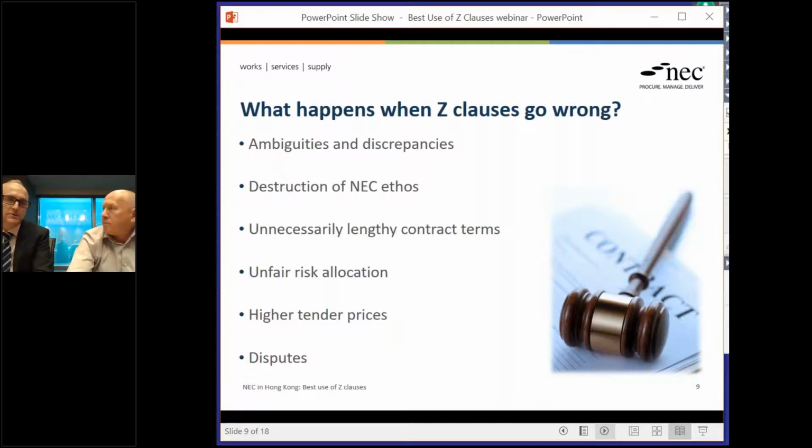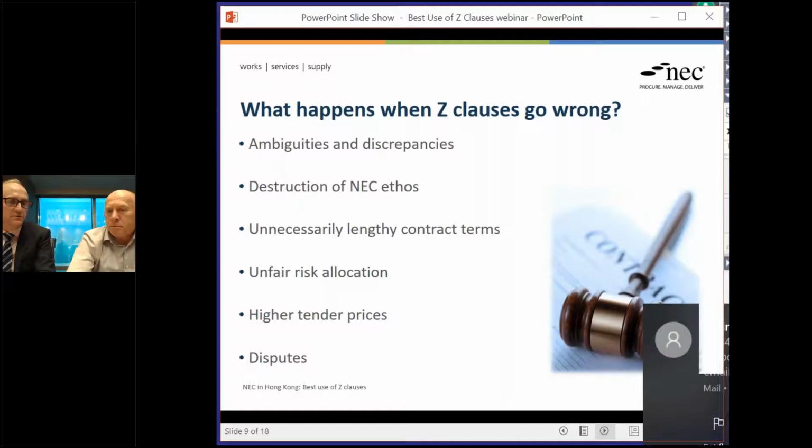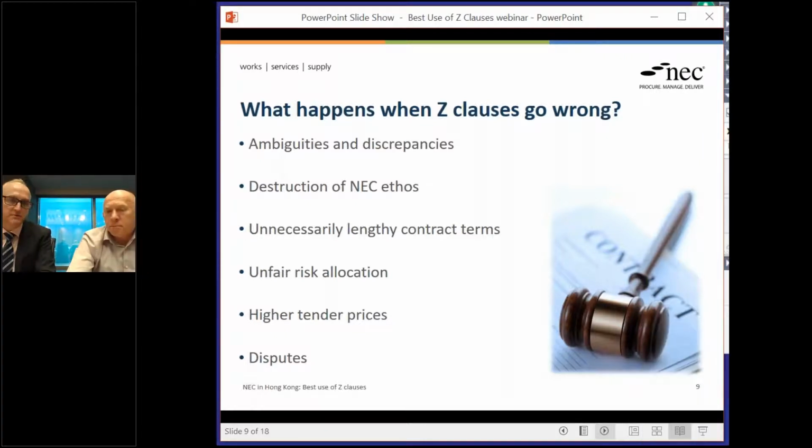definitions there. One party was saying the one in option X should take priority, and that had a slightly more restrictive extent of works, from memory, whereas the works information had much more scope within it in the description of the sections. The point is, it just led to a dispute, and the court had to decide, and from memory it eventually resolved in favour of the employer and said it was the longer description of the works information that applied.